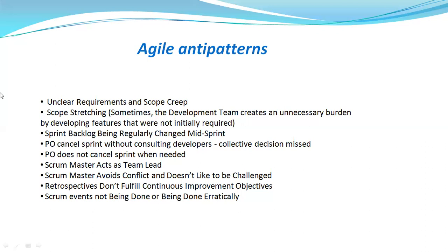Next point is scope stretching. Scope stretching is nothing but, sometimes the development team will be focusing on features which were not initially required. Some additional features will be there. The scope of a story will get stretched. That is also a kind of scope creep, I used to tell. So this also should be avoided.